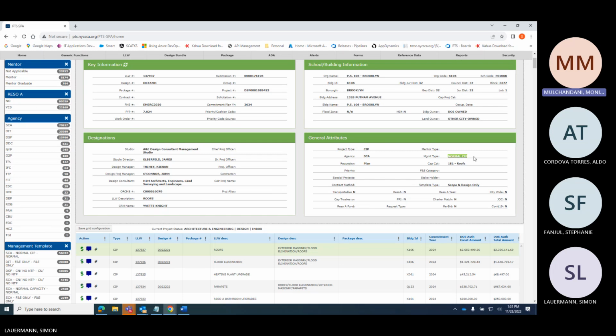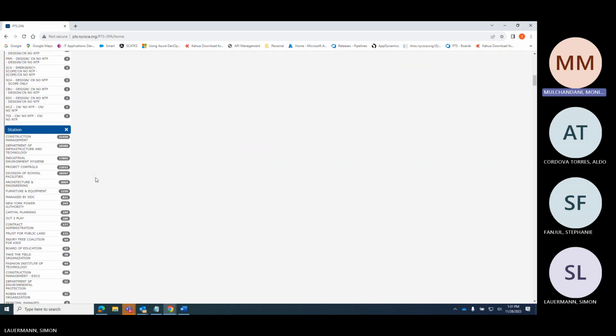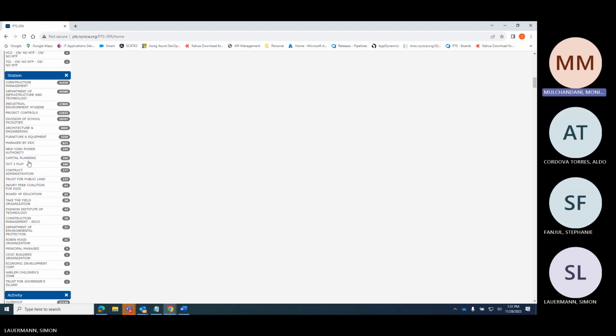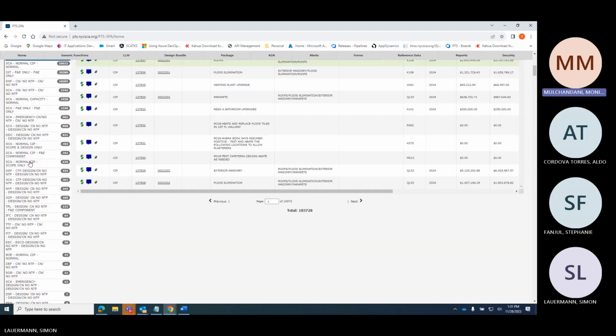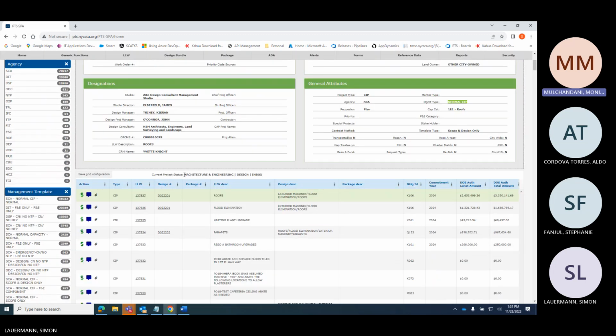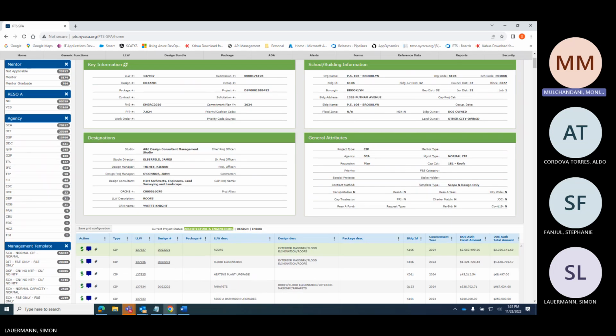Once I cover this, the next ones will be a little simpler to understand because they'll be subsets of this. So it starts its journey with project controls, where it lands and some processing is done. Once they're done, they hand it over to the next department in the workflow. The next department is A&E, which does the scope and design. Scope and design activity pertains to A&E, so it'll always come with A&E as the first thing because it's done by the A&E department. It's their expertise or specialization that they do that work.